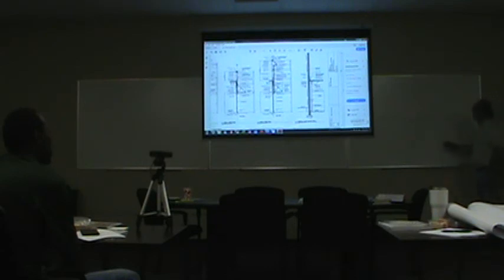So we got our wall framing done. Okay. What's our critical path? We'll ask a question. Wall framing takes 15 days. Plumbing takes 20 days. Electrician takes 25 days. Data takes 5. Blocking takes 2. Electrical, this is 10/15. Okay. 25 days takes you up to 11/9. Is that right? Takes you up to 11/9. We know that early start and early finish and late start, late finish are the same, that's critical path. We know it runs through the electrician. You got some float here. Everybody see that? Yes.